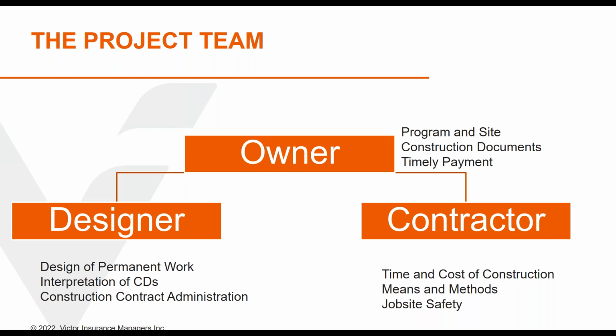This is called the Spearman Doctrine, and this is something that was developed by courts saying that, hey, contractor, you do have some kind of assurance from the owner that the information that's provided to you and on which you base that information is sufficient for doing the job.